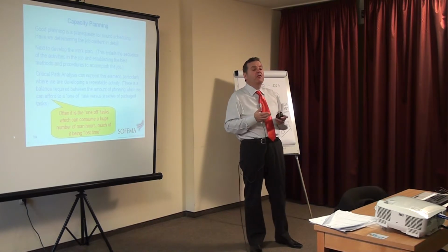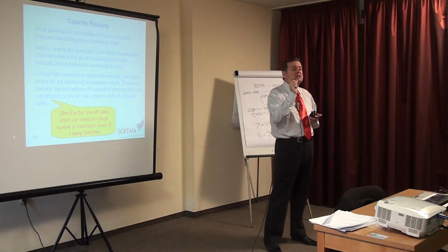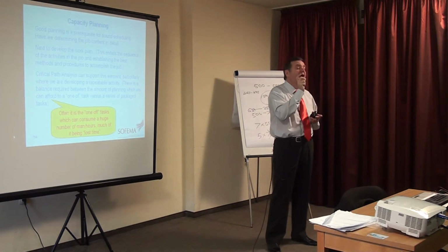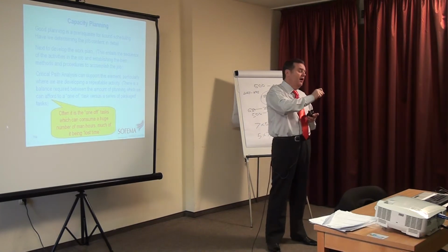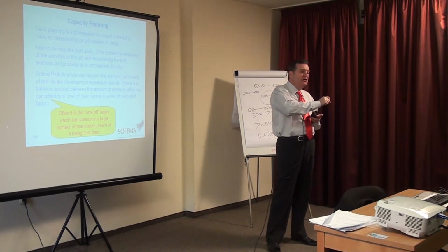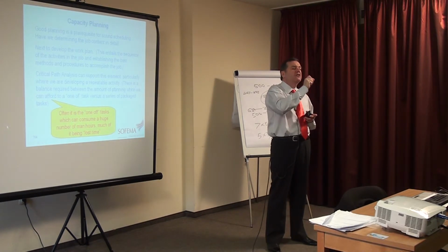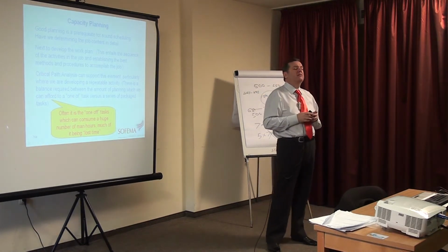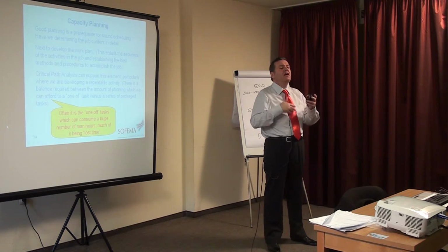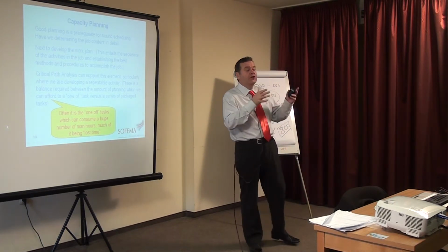So critical path will say that this task is a 2-day task on a 3-day check, has a 1-day float. Means that any time from the beginning of the check to the beginning of the second day, we can start that task without impacting the critical timeline of the activity. And that's the background, that's the basis. Basically understanding what impacts what.